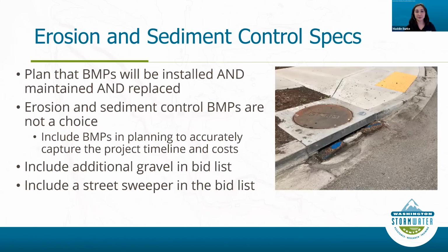So if you're writing specifications for erosion and sediment control, you want to plan that BMPs will be installed and maintained and replaced. In this picture on the right, the contractor was shoveling the sediment buildup at this inlet, and they were using that same whisker bar to protect the drain for months, and it looks terrible. The BMPs don't last forever. You can't keep emptying out the same witch's hat, so you have to plan that these BMPs will need to be replaced.